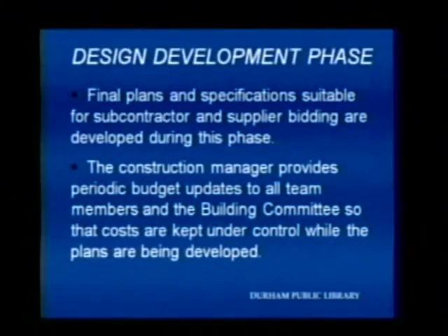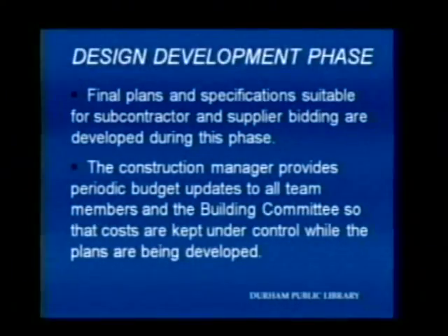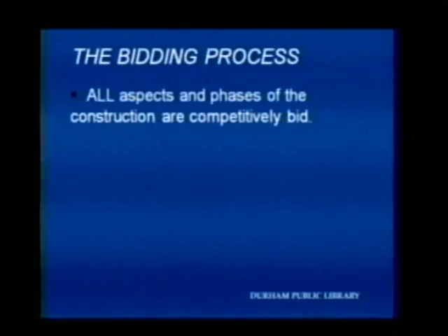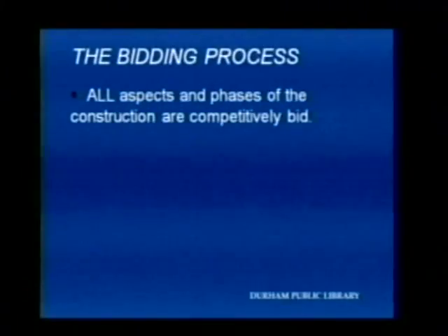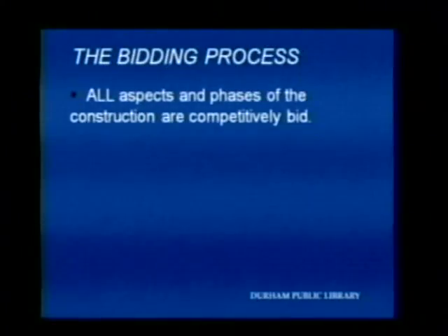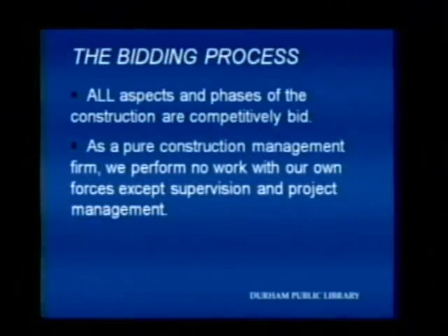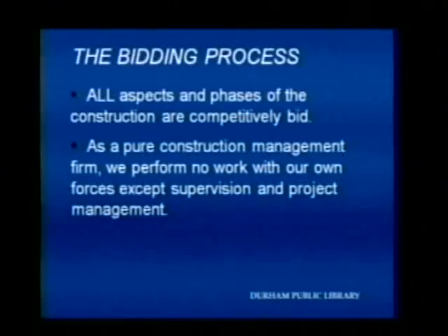They agreed, and so after plans are completely developed and approved by the committee, we will go into what we call the bidding phase. In the bidding process, we want to make sure that we get as many bids from qualified suppliers and subcontractors as possible. This is one of the main ways that we're able to bring prices down.